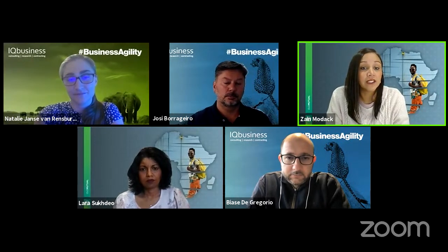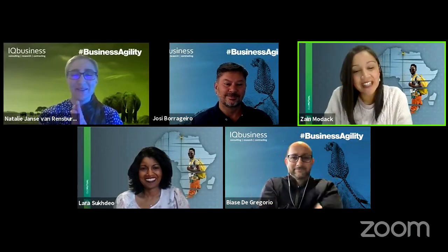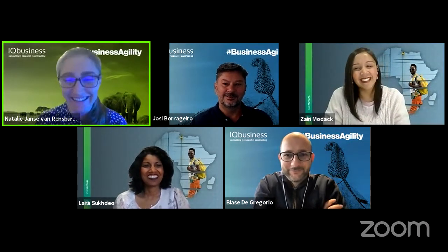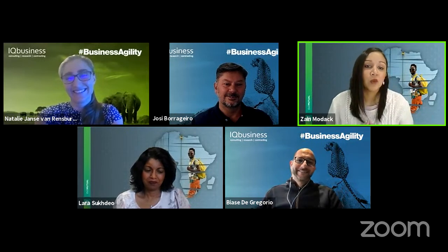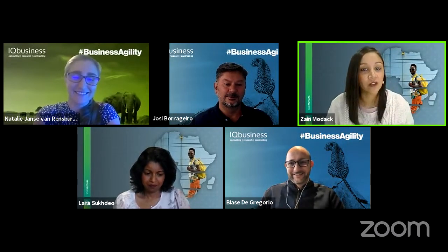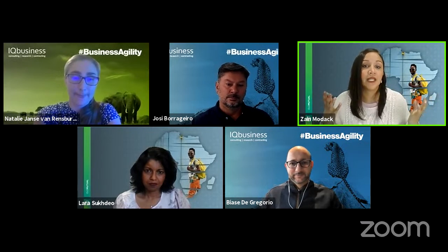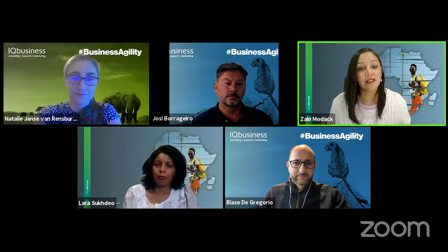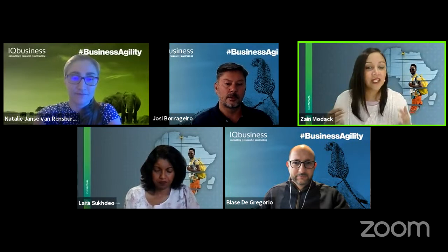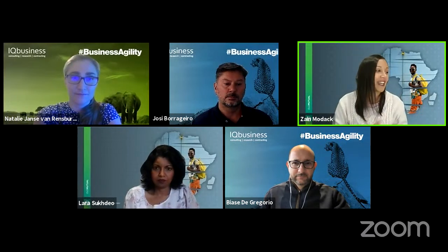We also introduced some of the framework around WSJF, which I saw Michelle posted there. So the W is Weighted Shortest Job First. That's your J first. And even with introducing that framework, we had to introduce it at different levels, so it's complicated. When we talk to the EXCO about epic sequencing versus when we talk to the teams around feature sequencing, it looks different. So we've gone through a journey to figure that out, and we're still inspecting and adapting on that one.